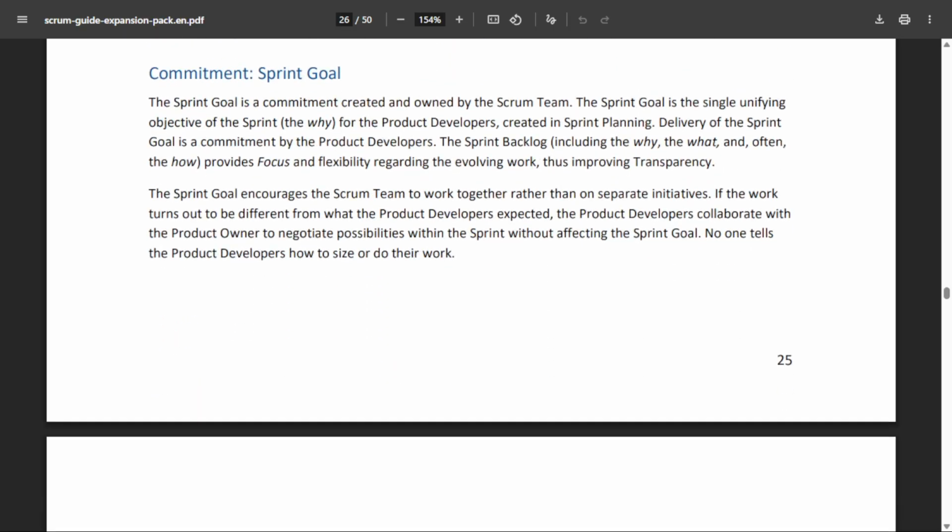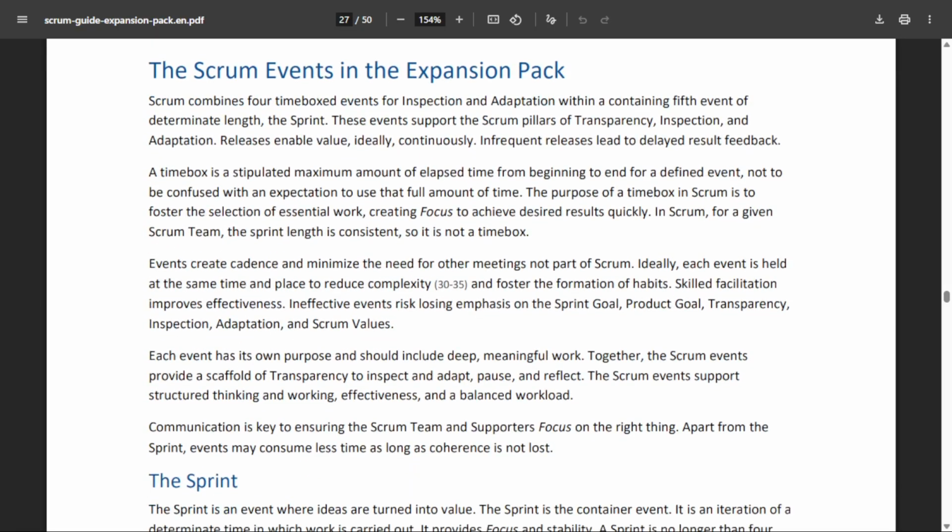All right, moving on to the next piece here, we have Scrum events. And remember, we had 5. So here we have the sprint planning, the daily Scrum, the sprint review, and the retrospective. So we understand the sprint is a container for everything else. Sprint planning is where we establish the purpose of the sprint, the what, select backlog items, and the how.